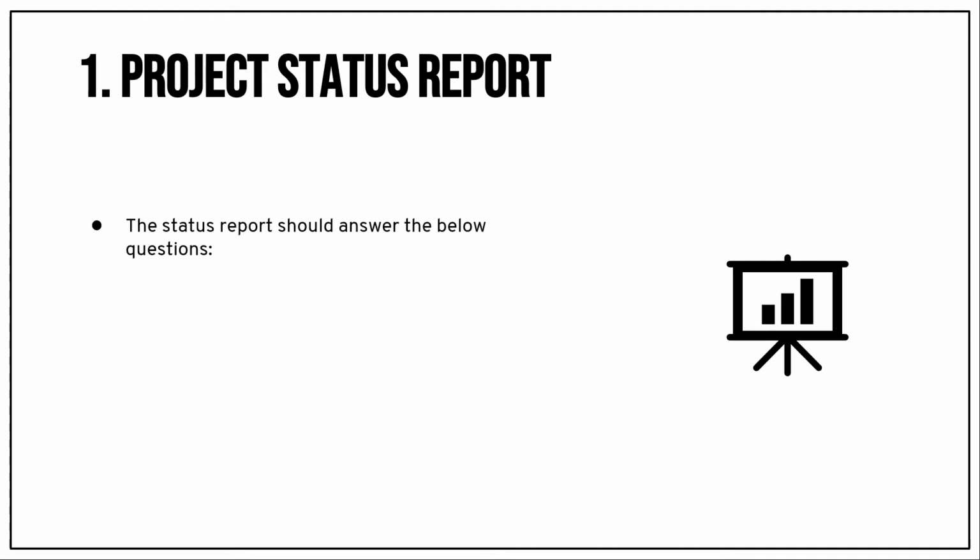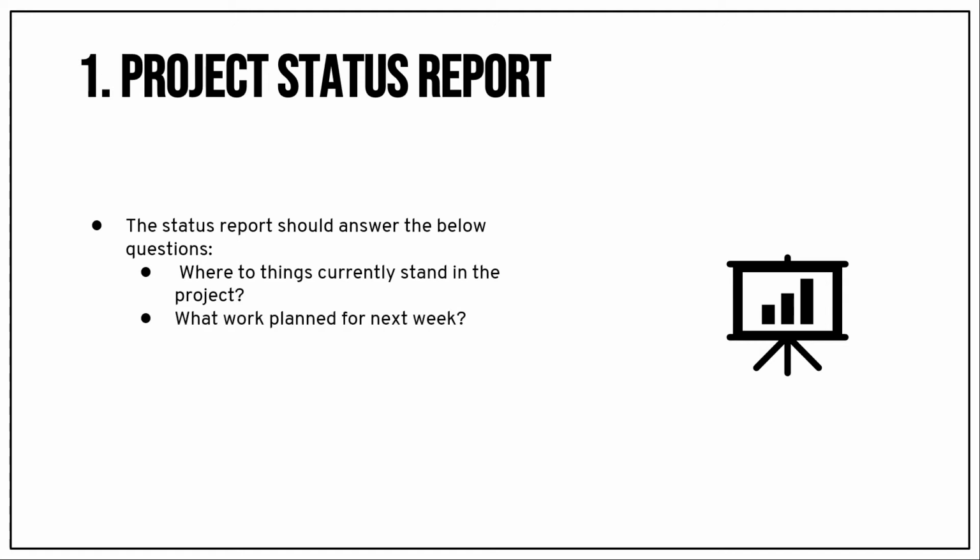The status report should answer the below questions. The first one is, where do things currently stand in the project? What is the current status? For example, we can put milestones in our project status report and provide the status. What is the current status of requirement gathering? Of the development activity? Of the incremental deployment? That way we can give the current status of where we are standing,